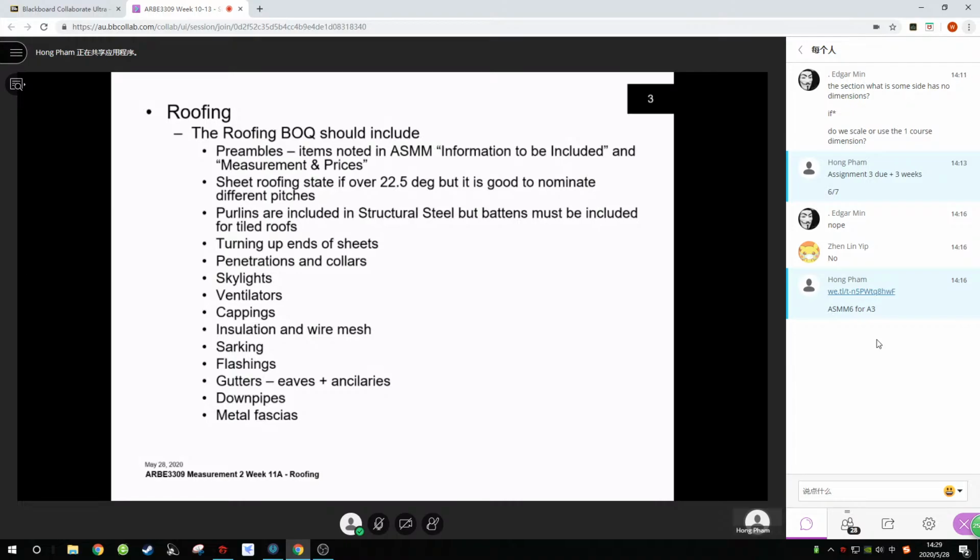Early projects, and he wore a bow tie out to site, which I thought was a little bit sus. But this is back in the 70s, where things were fairly rough. So he turned up to site in a bow tie. I hit him with the "fixed to and including furring channels" and said, you've got all this wall cladding, you haven't got any channels anywhere, the Quantity Surveyor hasn't got them in the bill, and here's my variation, which was a massive variation. And Bob tried to argue with me, and I said, no, Bob, you can't have that. And he cried. He said, the client won't accept this, and he cried. So there I have a bloke on site with a bow tie and crying, and he's an architect.